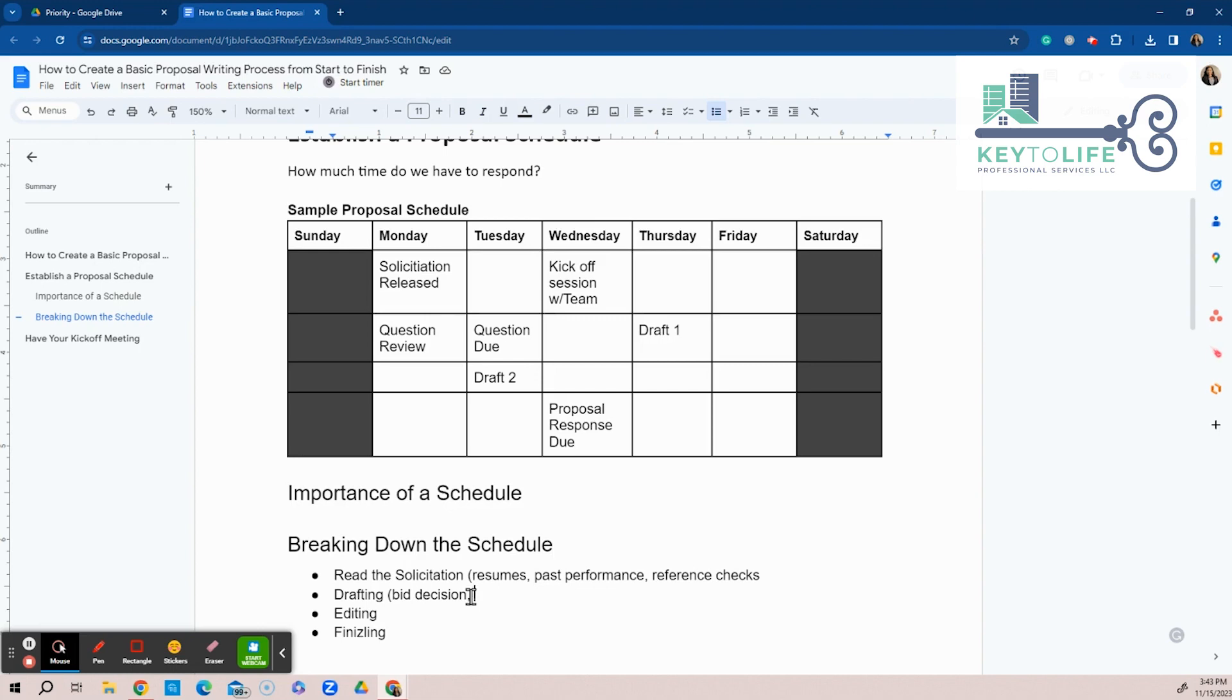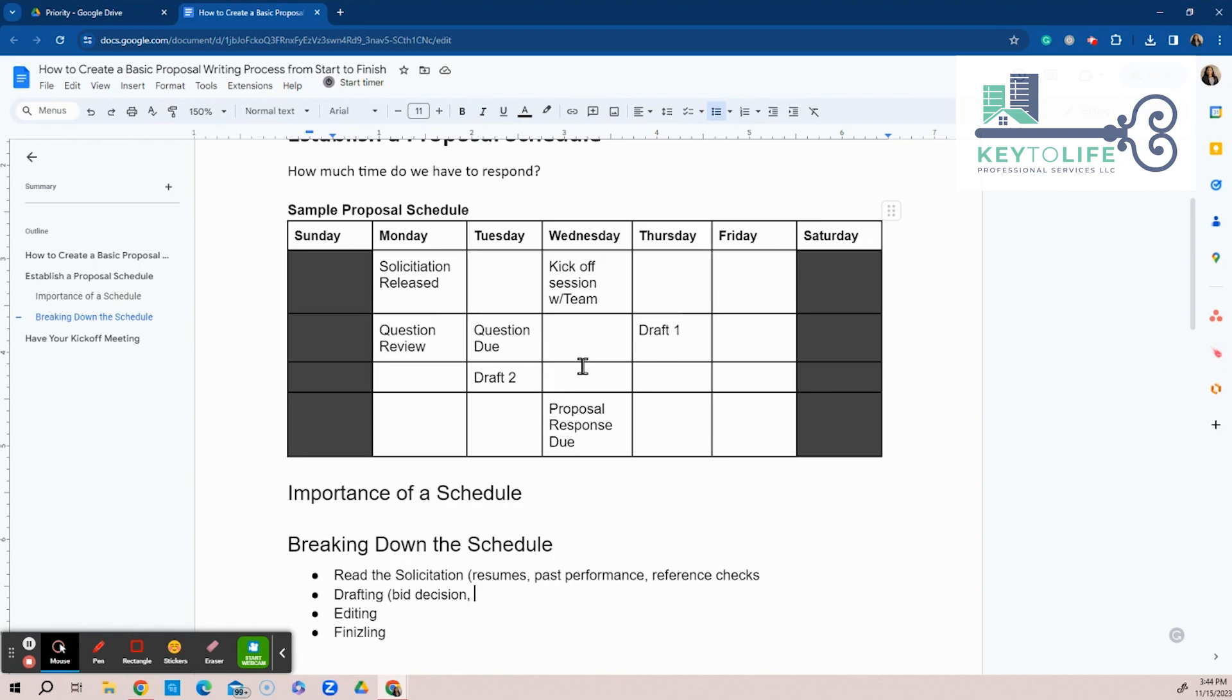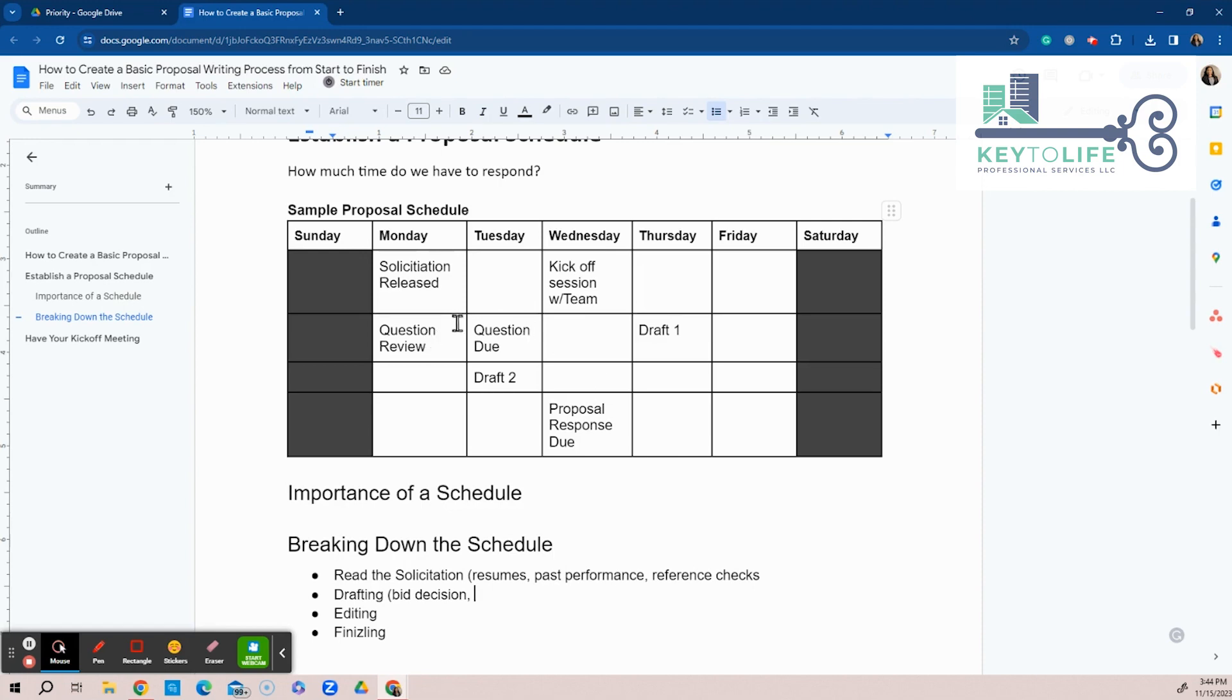But if there's no processes in place, there's no procedures in place, it's going to take more time. And then you're not going to be efficient with that time. So it's important. So when you're doing your bid decision, these are the things that you're going to take note of when you're adding them to your proposal schedule. So you can kind of see, okay, it took me three days to read the solicitation. So I don't want to have the meeting until Thursday and the kickoff team meeting. But we got to have the kickoff meeting prior so we can get the questions. So I can review the questions and then get everything together so I can send it up by the due date for questions due date.